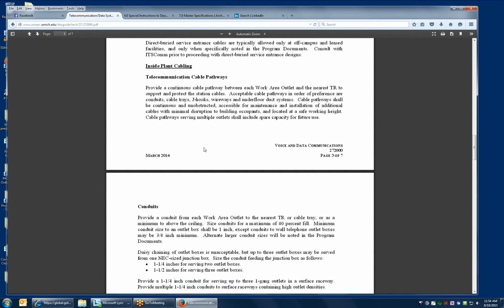Check-in areas, check-out areas. Before, we used to just do 3 cables, 2 voice, 2 data. And in an office environment, in the VoIP world, now we're just pulling 3 cables, all data, because VoIP is over data now. But in a BICSI standard, an office of 10 by 10 is 2 outlets per office. That's 6 cables, and there might only be 1 desk in that office. Now we're over designing. We put a phone and a computer on there, it's using 1 port, maybe leave 1 for a printer. What are we doing with those other 4 cables for the next 10 years? If they go to add another person in there, you're kind of set, but we can't project that.